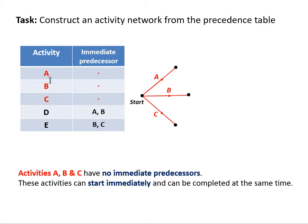First of all, activities A, B, and C each have no immediate predecessors, so we know that's our starting point. Nothing has to be completed before A, B, and C can be commenced. So they start simultaneously, and we have activity A written on this edge, activity B on the center edge, and activity C on the third and final edge.